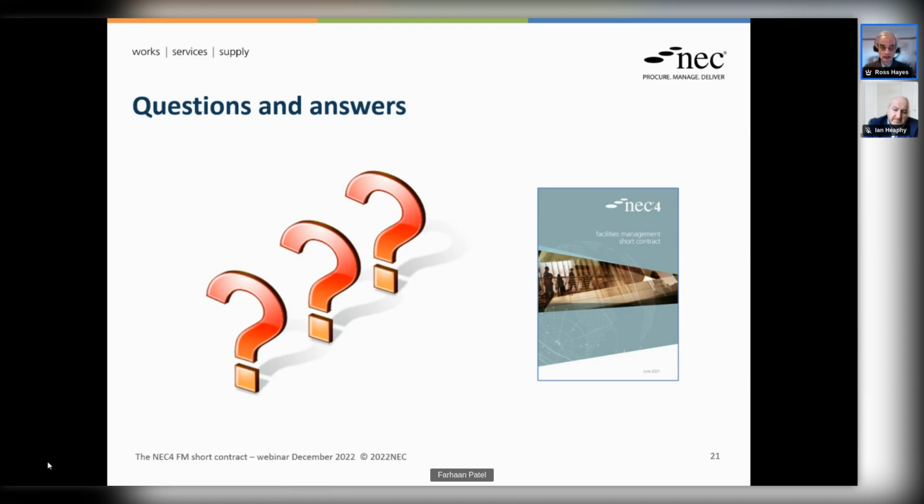I think in one sense it's partly your choice of language. The FM contracts suite was worked up, I will put a plug in for this, with the Institute of Workplace and Facilities Management, the IWFM, who'd come to us to say, look, we need a standard form of contract if we can do it, because we've got so many bespoke contracts. But the term service contract puts people off because it seems to be construction orientated in both its language and some of its processes. For example, the FM contract deals with a service failure, where the term contract would call it a defect, but it allows for the recognition that some service failures can't be put right.